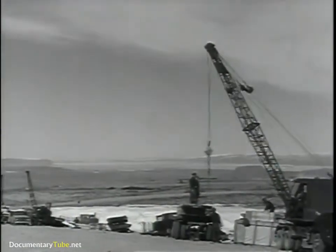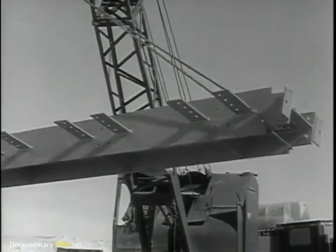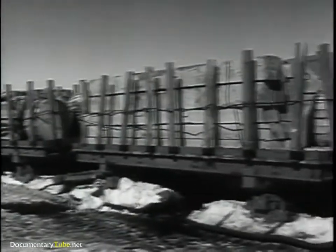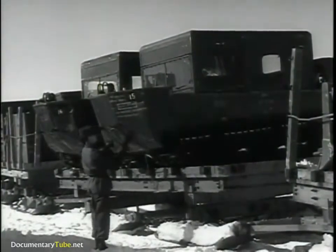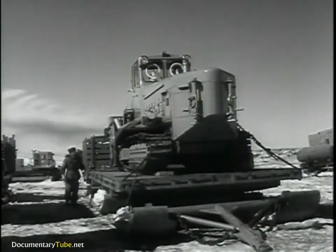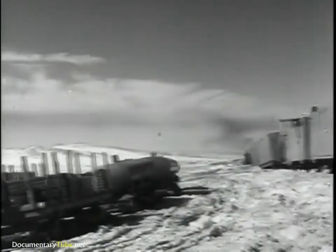We brought in everything this way: construction materials, steel arches, clothing, nails, steel beams, prefabricated houses, lumber, food, even ice cream. In the months it took to build Camp Century, more than 6,000 tons of supplies were used. Even the vehicles we used at the site had to be transported over the ice on big bobsleds. We called these convoys of 10 and 20-ton sleds heavy swings. Crawling up the ice cap at approximately 2 miles an hour, a heavy swing would reach...